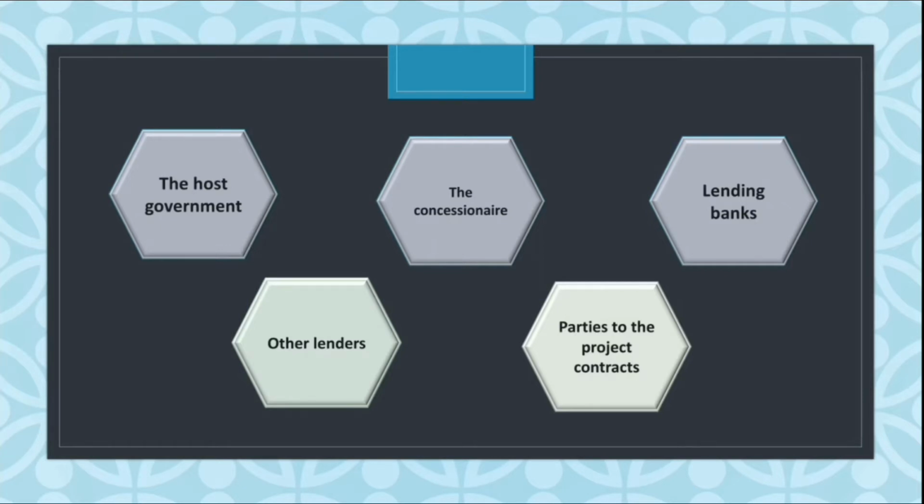The government normally provides support for the project in some form, which is the provision of land or change of laws. The second one is the concessionaire. The project sponsor acts as a concessionaire, which is someone who has been given a grant of rights, land or property by the government to create a special purpose entity which is capitalized through their financial contributions.